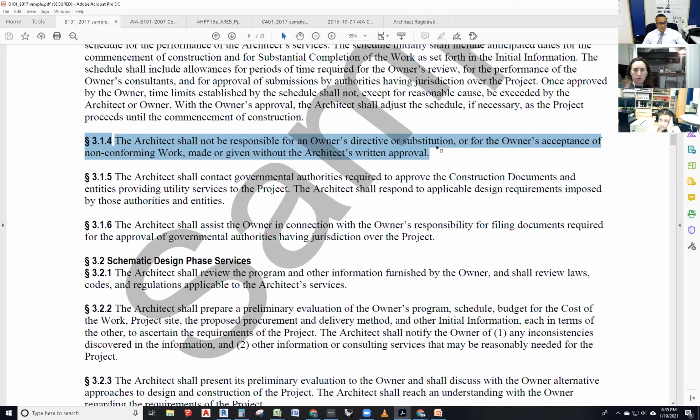Yeah, but that non-conforming work should still be documented. Absolutely. You're going to put it in writing. You're going to do an observation report and you're going to say your two cents or five cents. You're going to say that ramp that has been accepted by the owner is a non-ADA compliant ramp. And I will have rejected it. And it is rejected by me. But the owner has directed the work to proceed. Period. Save it up. Send it to everybody involved and you're done.